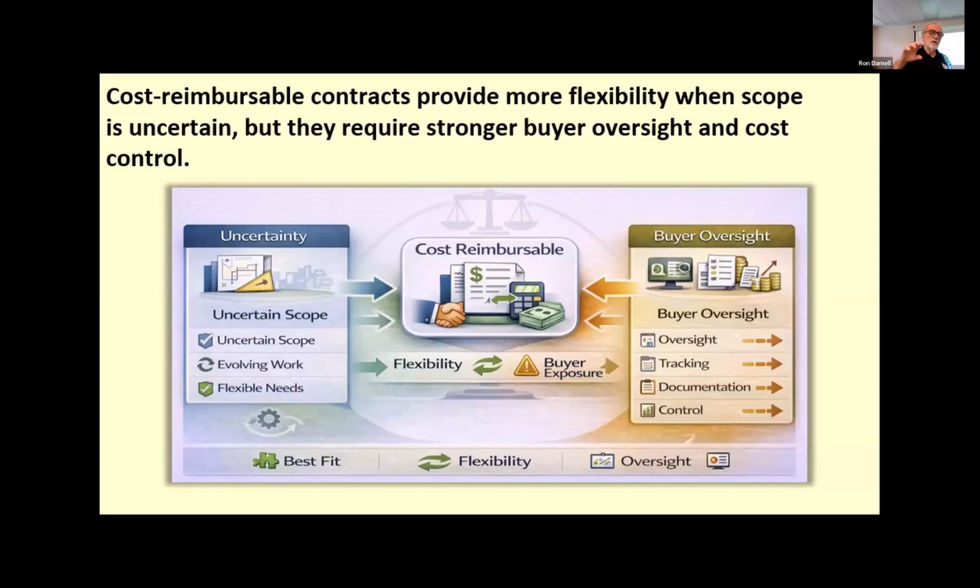And this is why cost plus or cost reimbursable contracts are kind of good for the adaptive model. Probably more of a preference there because it gives you that room to manage and have the scope be flexible. However, most of the adaptive projects that I've worked on, they will fund a team at a fixed price.